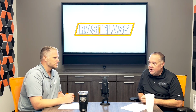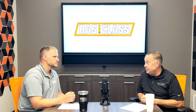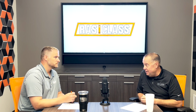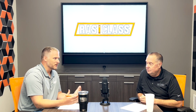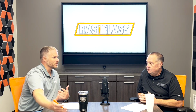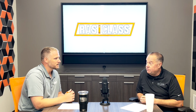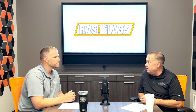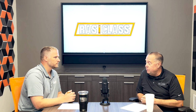Right. We try to make a site visit to every rental boiler before it delivers, just to make sure that the assumptions that the customer's making align with what's really needed. And if it's far from here, then how does that work? Do we recommend a partner for them, or that they work with their local shop? They'll work with their local shop. I'll ask for pictures of the spot. Where are you going to set this? Send me a picture of where you're setting this. We lay an eye on it and see what we have.